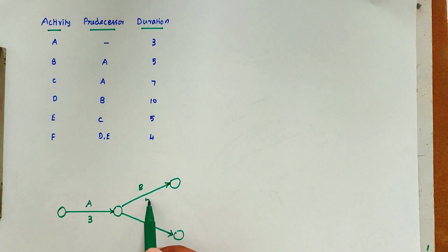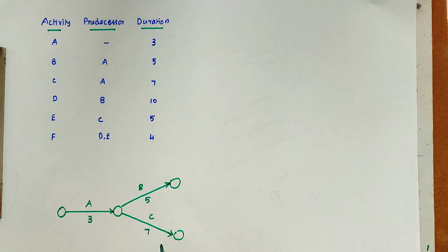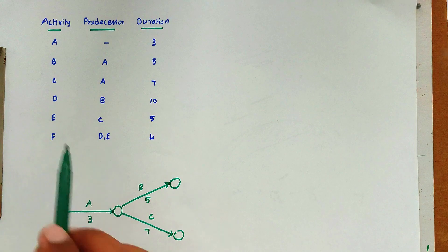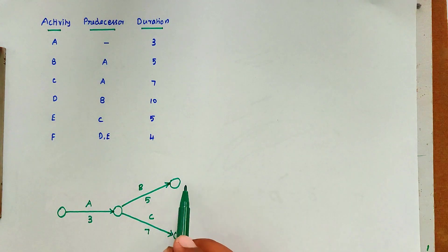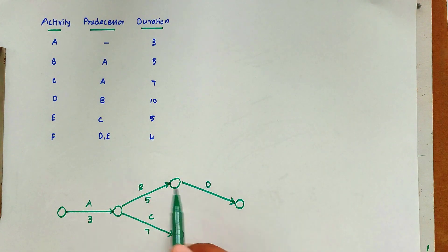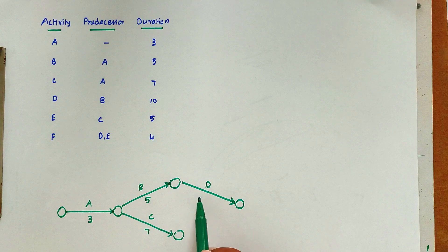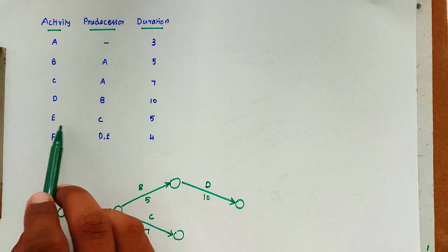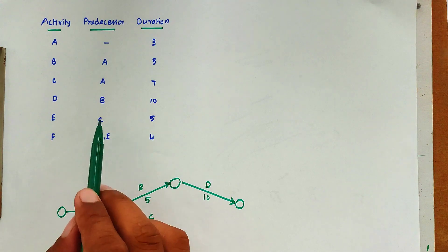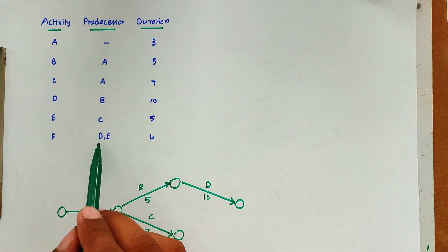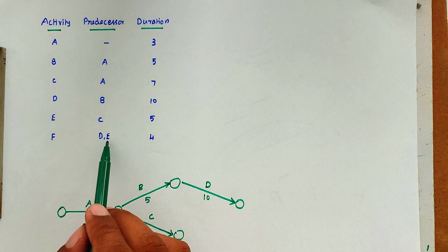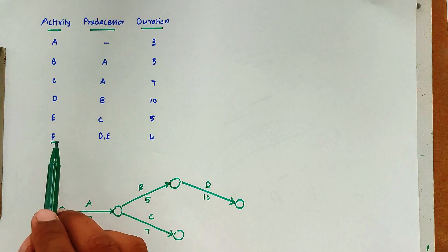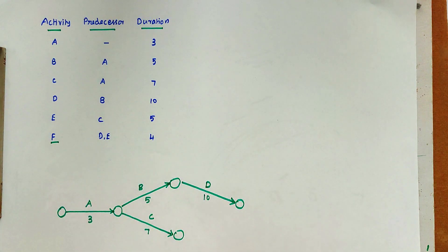Activity B has duration 5 and activity C has duration 7. Next we draw activity D, which has B as its predecessor, with duration 10. Then we draw activity E, which has C as its predecessor. Note that D and E are both preceding activities of F.